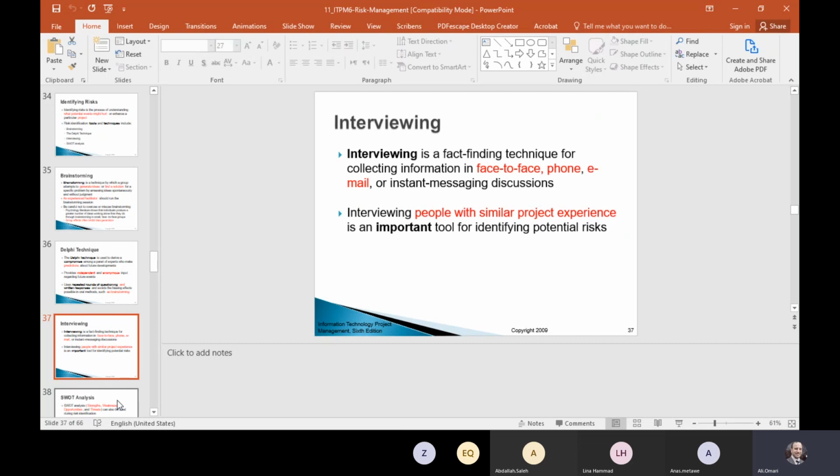When I worked as a consultant, I had to write lessons learned for every project we finished. I had to list what the problem was, what the pain points were, and so forth during the life of the project. We had to document it and place it in one place, so you can go back to this note when you run another project to avoid the risks.